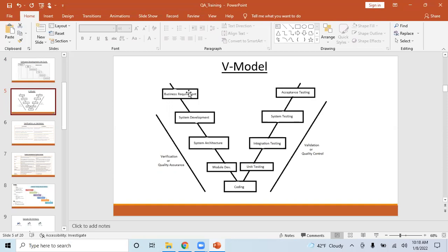Nowadays in Jira, you can even tell in your interviews that when we are analyzing requirements in Jira, we make sure that it has acceptance criteria. There is a section in Jira called acceptance criteria. We will make sure that the business analyst or product owner who is writing that requirement also mentions what the acceptance criteria is for that requirement.